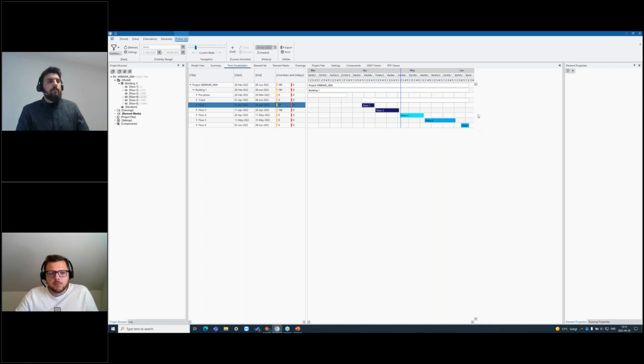Great. Maybe you also noticed that we have some white activities here that are not really connected to the building or project. And what could that be? That's something that we call custom activities. And in a project there are a lot of activities that happen, and not all are related to the precast part of the project, but some are. So to highlight those and to include those in this Gantt chart, we have created something called custom activities.